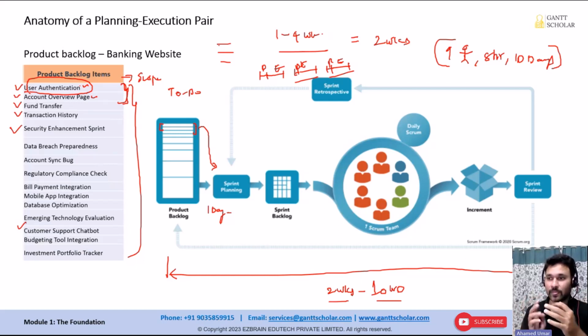They're doing estimation. Okay. And the job of the product owner, we'll learn about someone called product owner. This product owner should provide the goal. Okay, guys, you can work on these two features, implement this in this iteration. So this is your iteration goal, and the requirements will come from the product owner. So the team members will not go and search for the requirements. They will only approach the product owner, give us the requirements. All right. If they have some doubts and questions about the product, and if they need more details, they'll ask the product owner. And the product owner will provide the acceptance criteria. See, guys, once this work is done, I will ask you X, Y, Z questions. You need to prove that these criteria are fulfilled by the product.